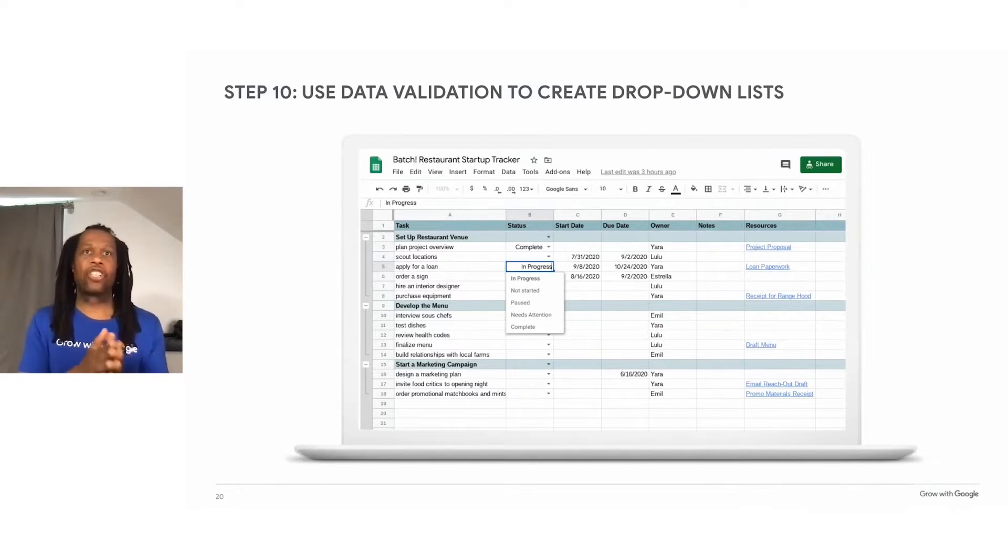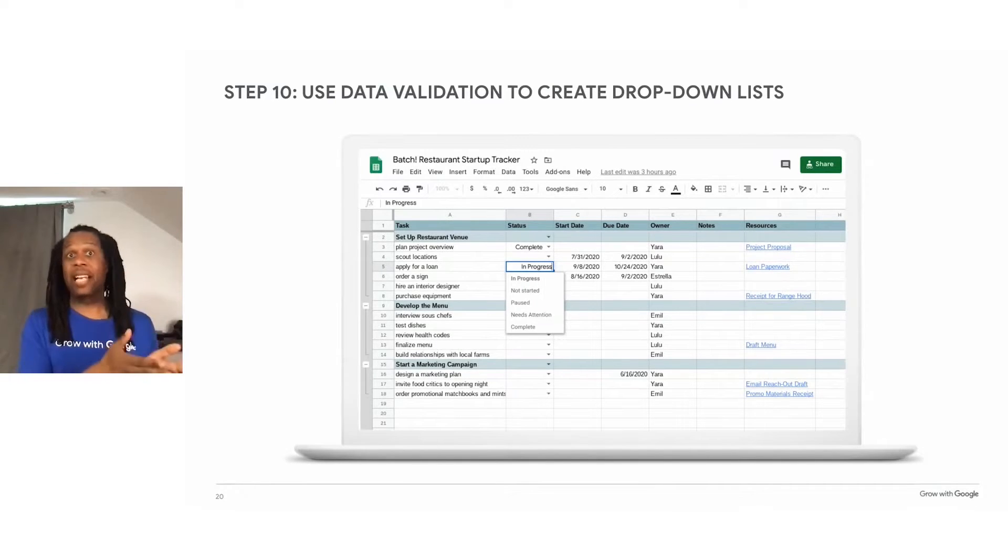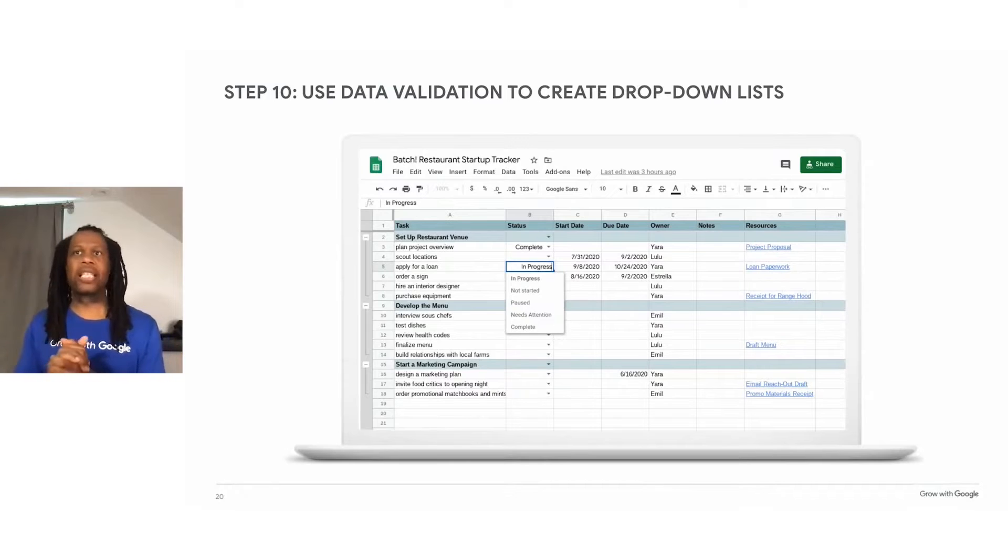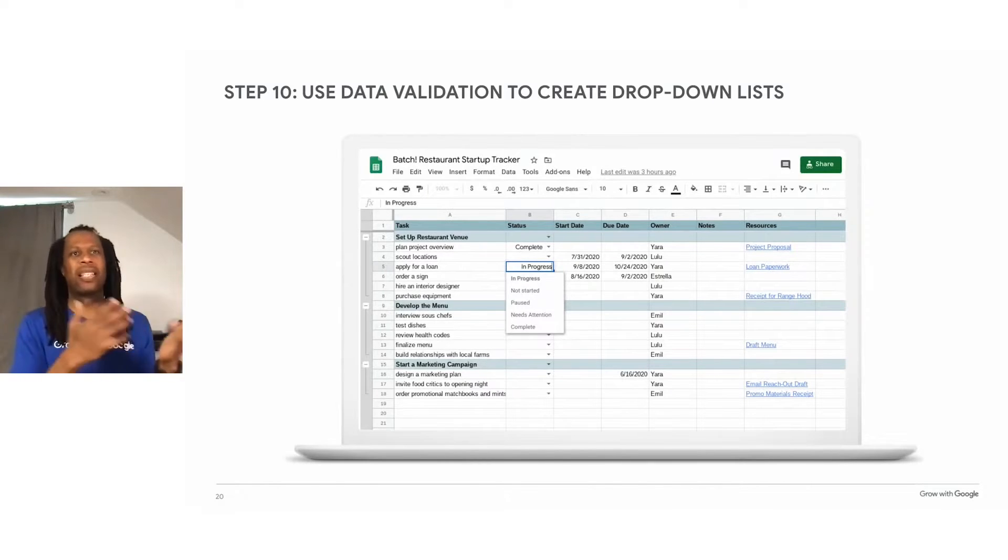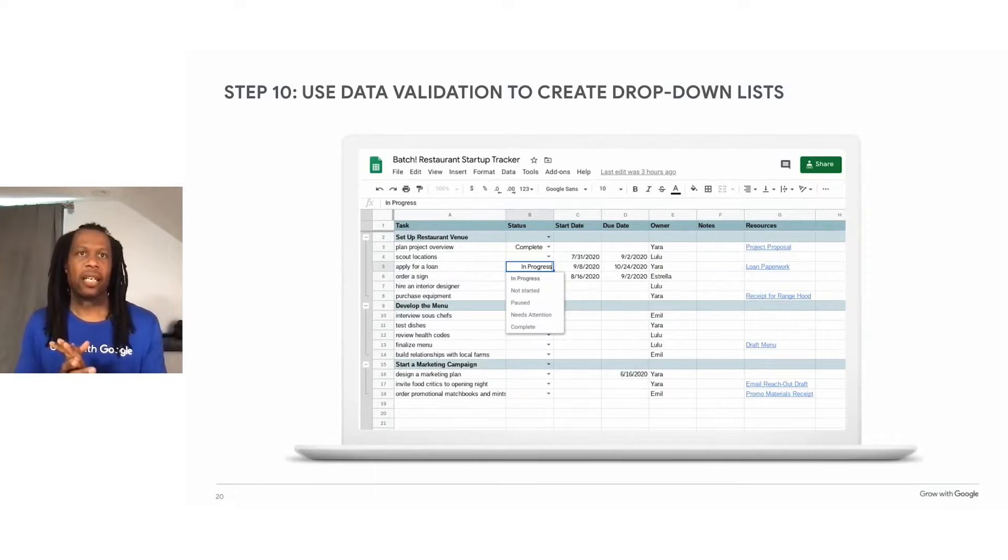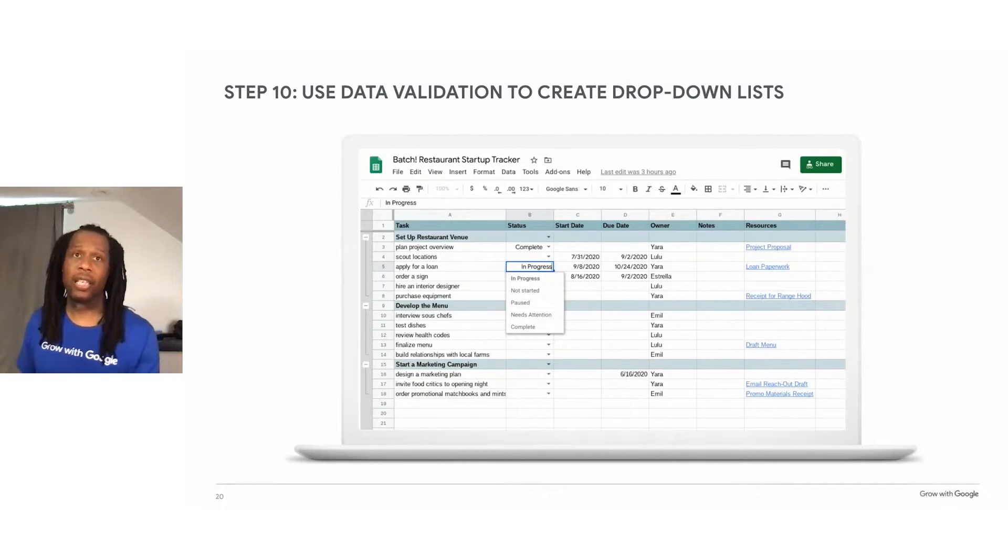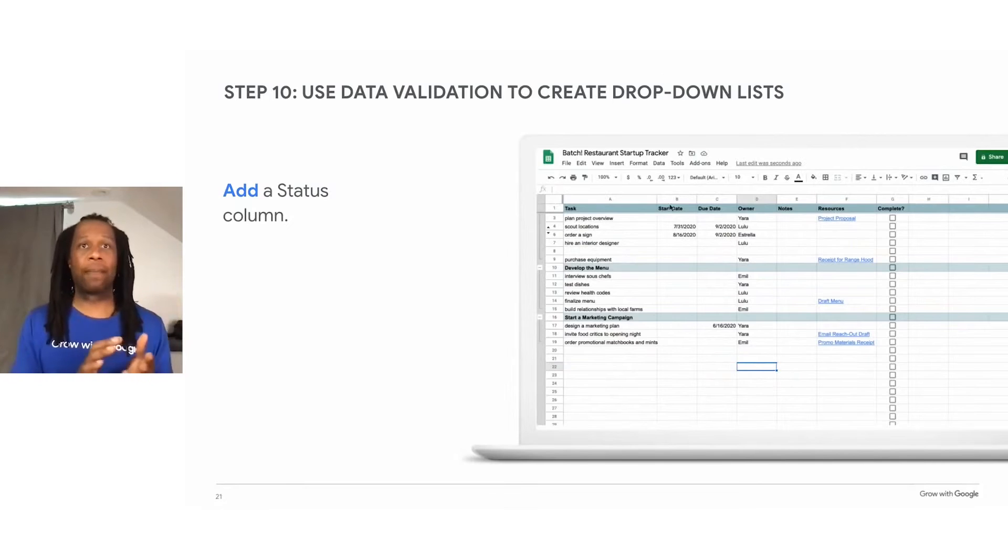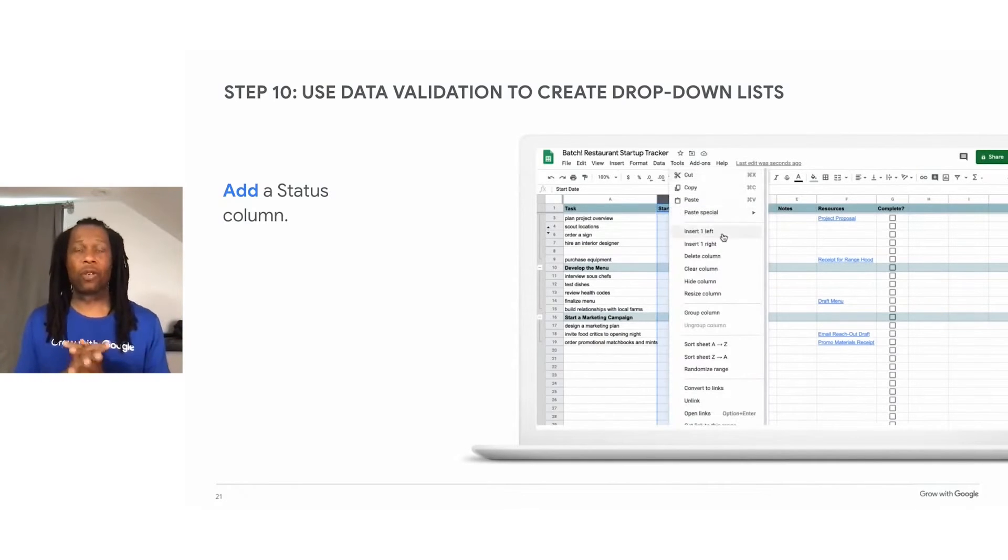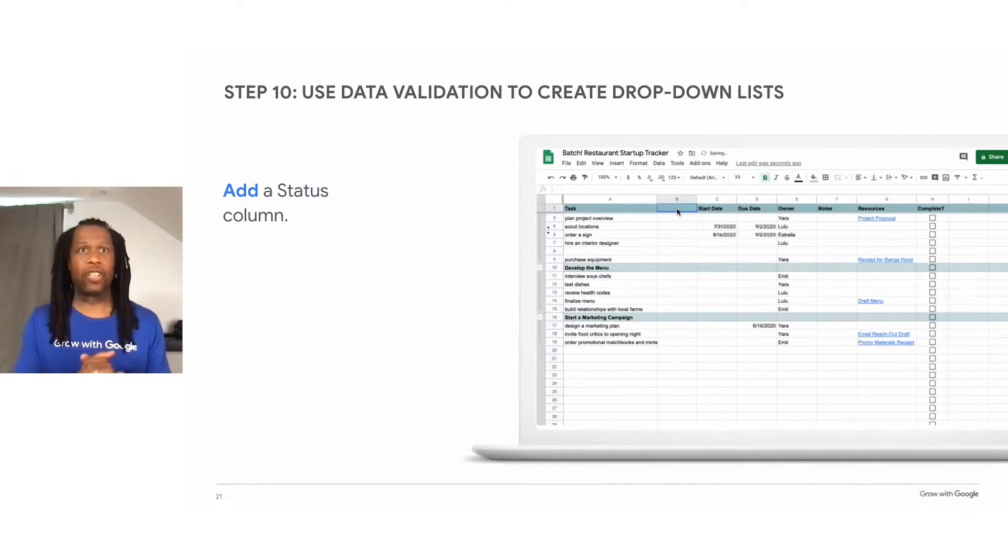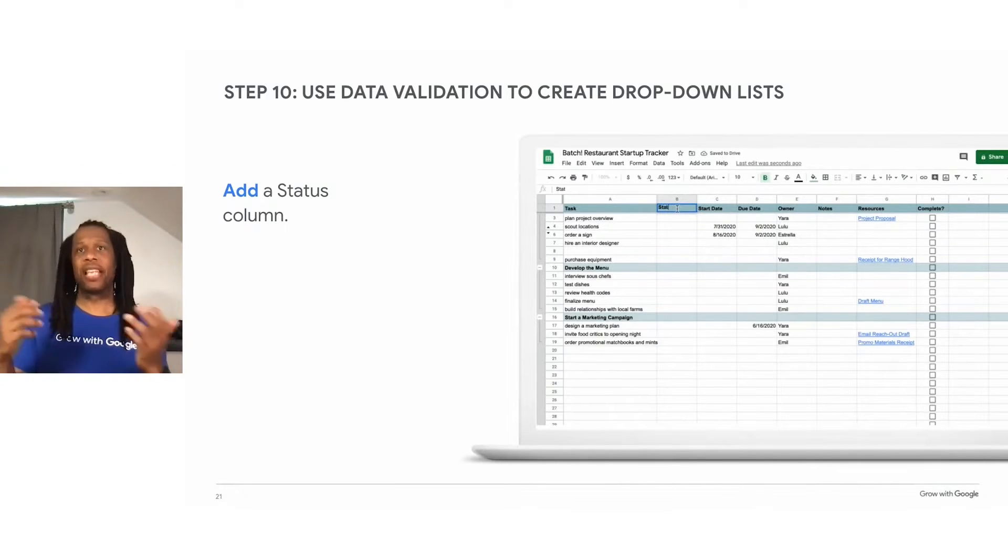The image on this slide shows a spreadsheet tracker. And in the status column, the user has added a dropdown menu showing different options to mark the task statuses. You can create one of these yourself by using the data validation function. So to add a status update dropdown list, you want to add a new column for status. And this animation on the right shows a user adding a new column and then labeling it status.